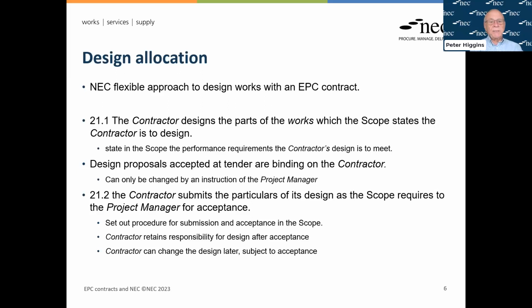Clause 21.1: the contractor designs the parts of the works which the Scope states the contractor is to design. So the Scope is an important document. It has got to set out the performance requirements the contractor's design is to meet. Now, there could be some clients who have already done some level of design or specification of what they want, and aren't leaving the contractor with a completely clean book to do what it likes.